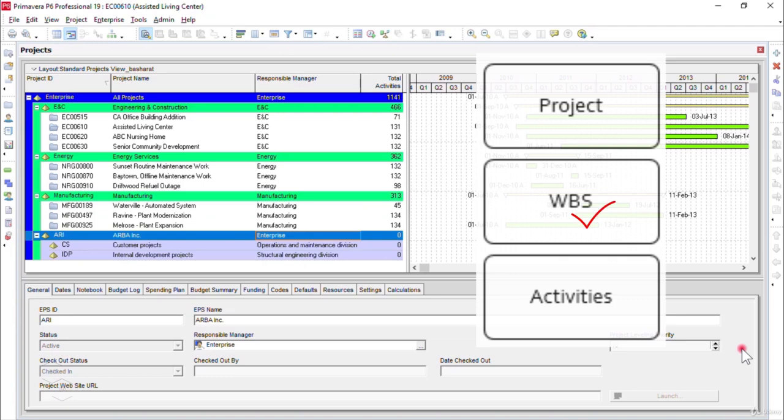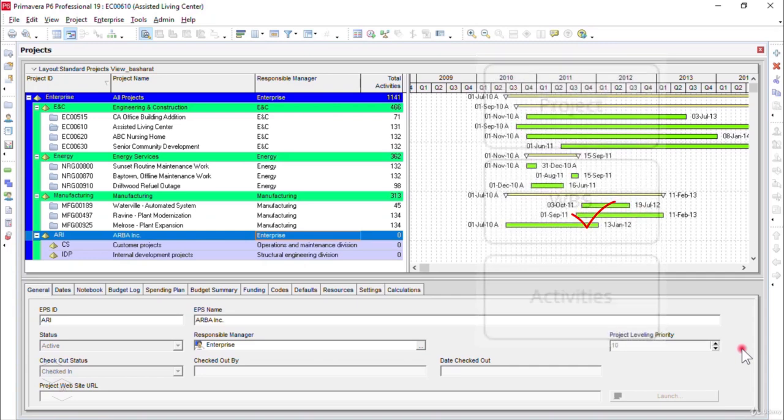In other words, we will further divide our project work into small parts or sections, which are normally called the WBS Elements or the work packages. We will also learn to assign the responsible manager to our project and WBS Elements as needed. So that means we will create a relationship, or link, between our OBS and EPS and our newly created project. Also, we will assign the OBS or responsible manager for our WBS Elements as needed by our project requirements.